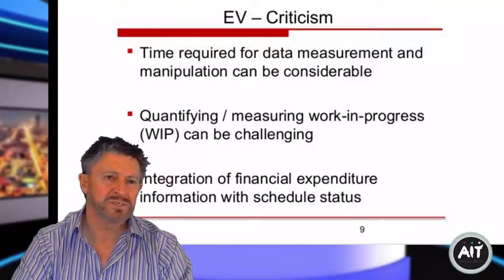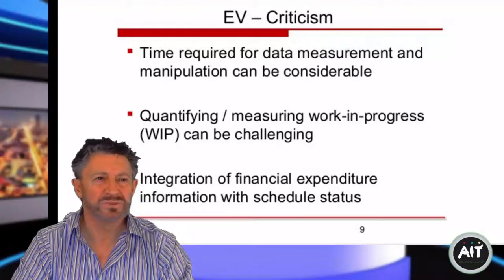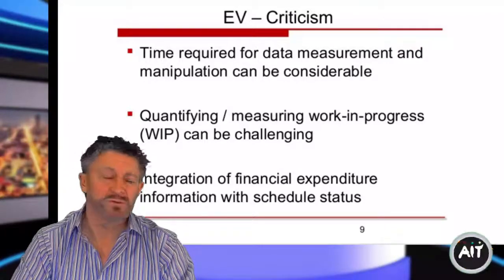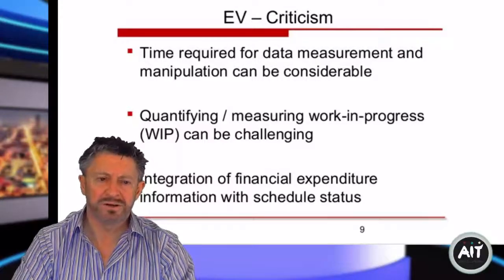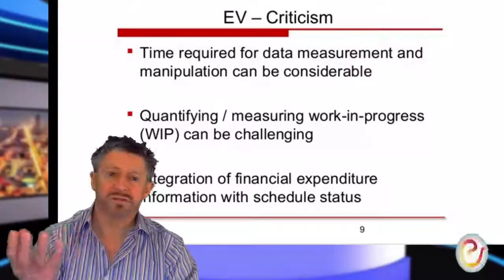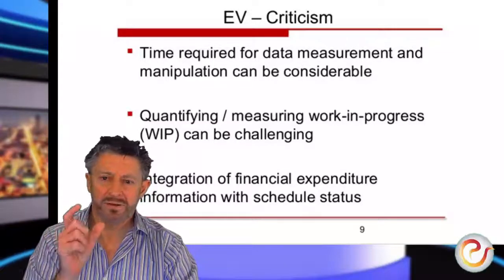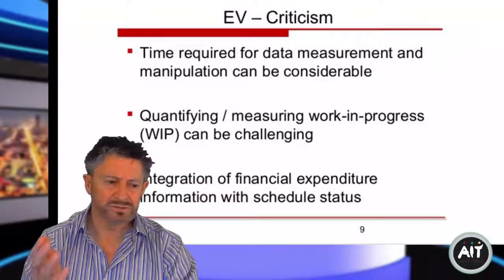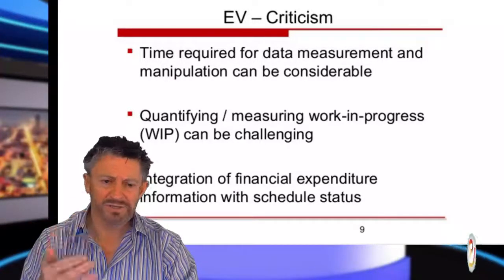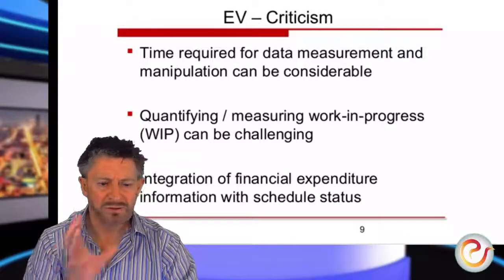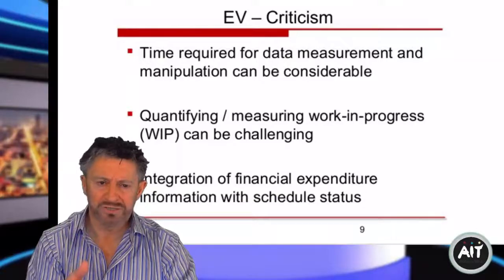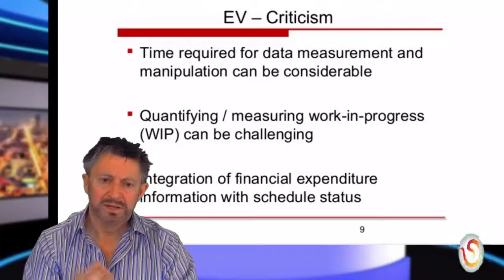Then it went up to £60, which would have pushed it up to maybe 80, 90 euros. It depends. It could be 150 euros man-hour cost, and that will say, well, that's the whole cost of having a person on this premises with all the light, heat, insurance, security, wages, salaries, pension, all those costs divided into that person, and this is what the organizational man-hour cost is.